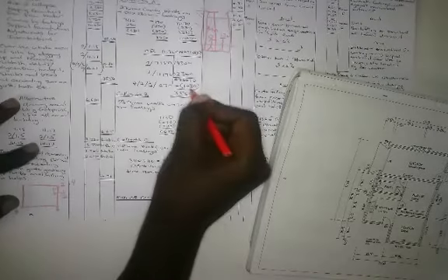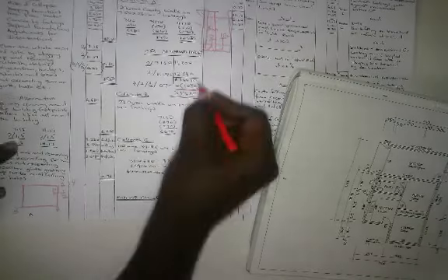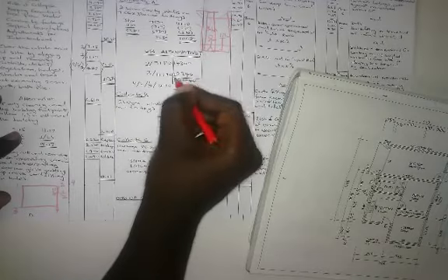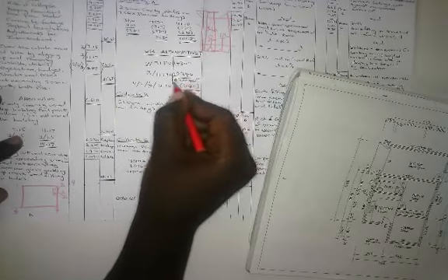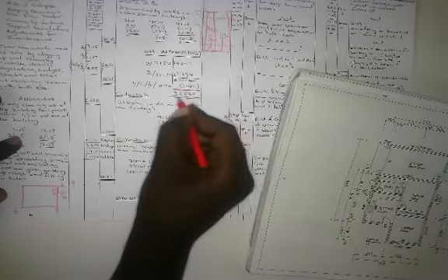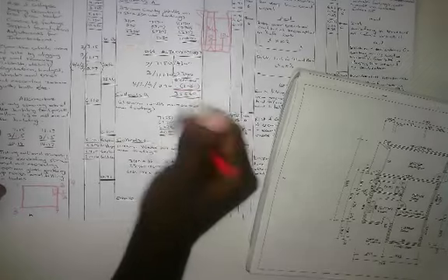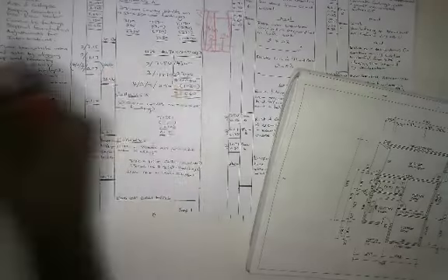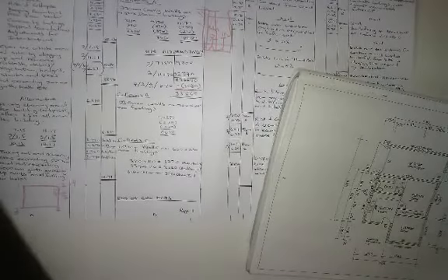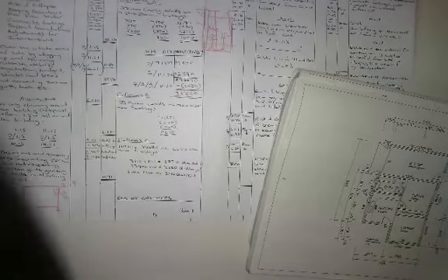Okay, so you're gonna say 4 times 2 times half times 270, which is your cavity wall. That will give you 1080. Okay, that will give you 1080. You're gonna deduct the total of these 2 dimensions, 14300 and 22340. That will give you 36640 minus 10080. That will give you 35560. Okay, that you will take and input in your collects. That's going to be 35.56.